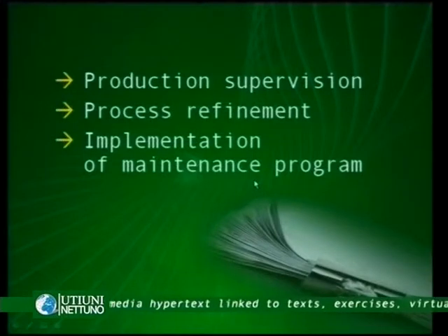Maintenance could be ordinary or extraordinary. By definition, ordinary maintenance is the one which is planned, scheduled, and could be monitored in a more effective way. Whereas extraordinary maintenance, by definition, is related to unexpected events. One common mistake that is very diffuse in investment projects is that sometimes it's easy to schedule and estimate the cost of the ordinary maintenance. Sometimes extraordinary maintenance is neglected.